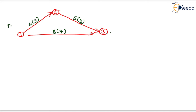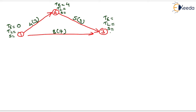We will now calculate TE, TL, and slack at each event. TE equals 0 for event 1. For event 2, TE equals 0 plus 4, which is 4. For event 3, TE is the maximum of two paths: 4 plus 5 equals 9 from event 2, and 0 plus 8 equals 8 from event 1. The maximum is 9, so TE for event 3 equals 9.